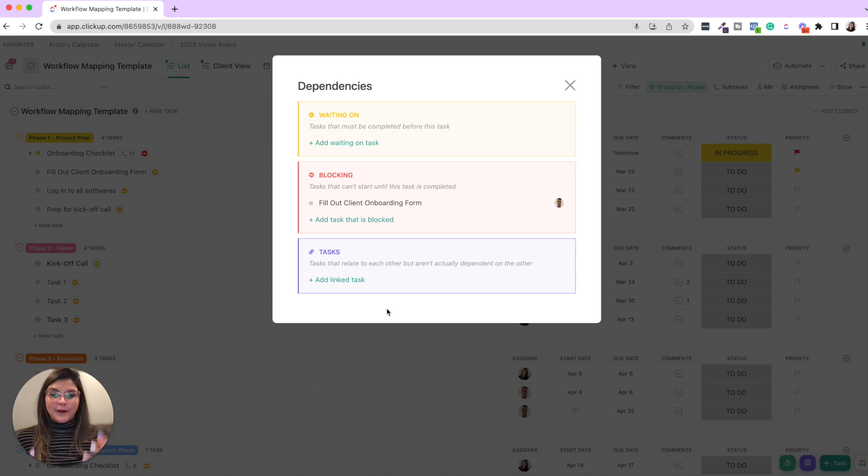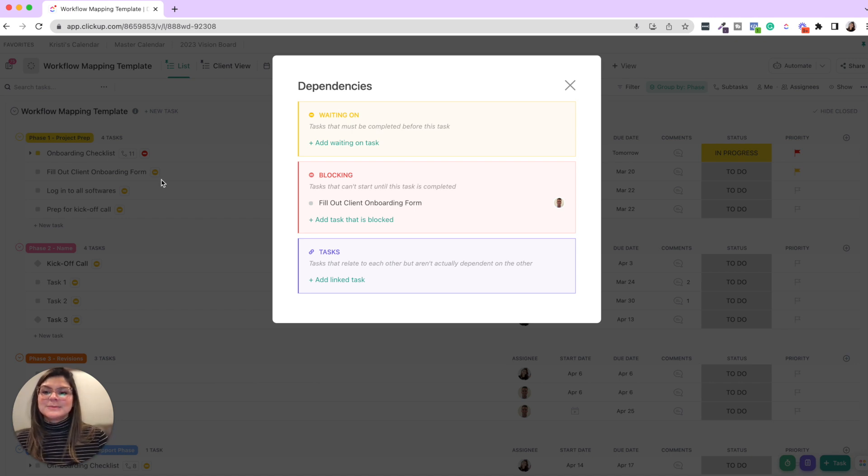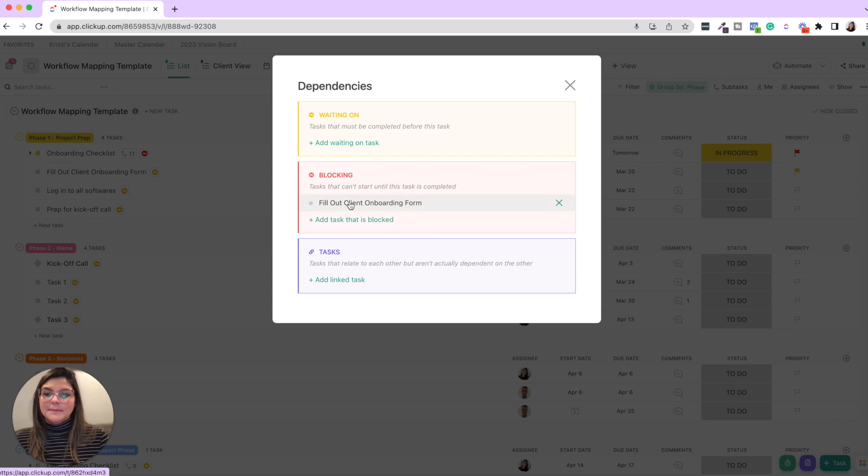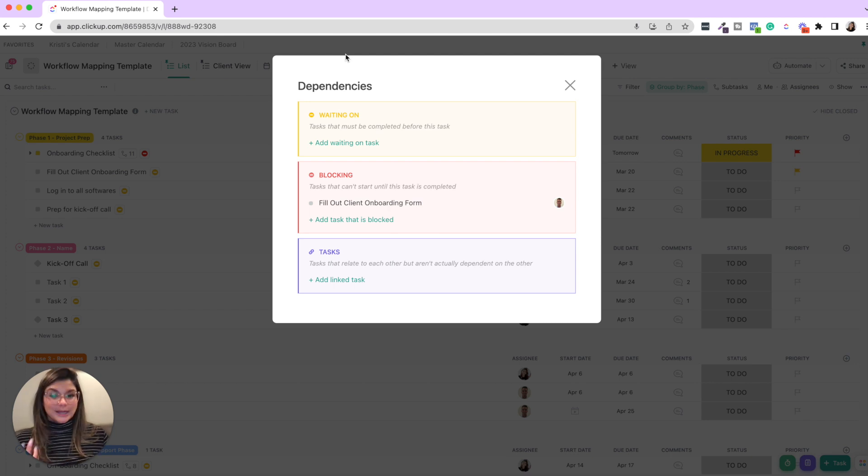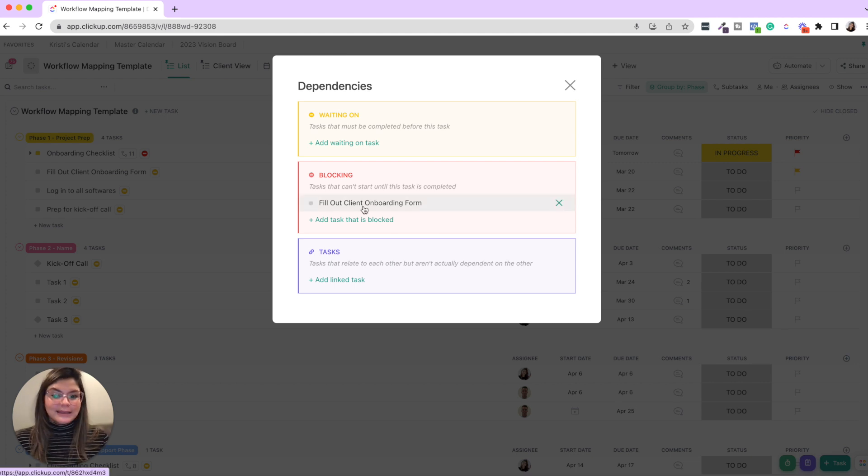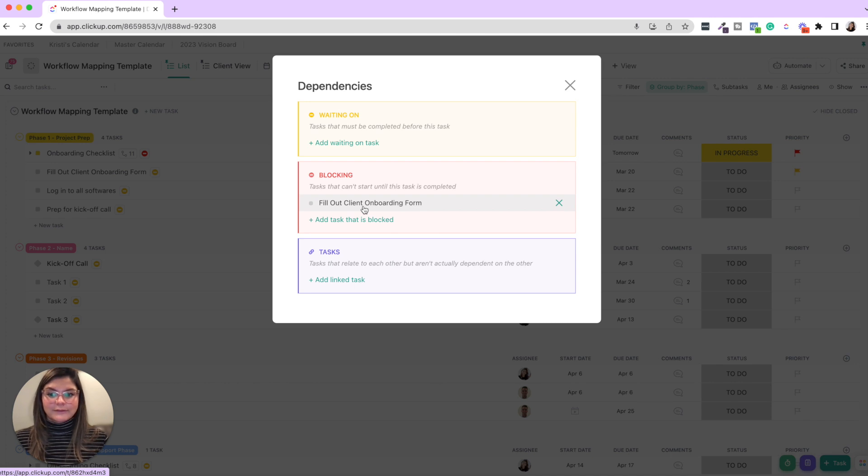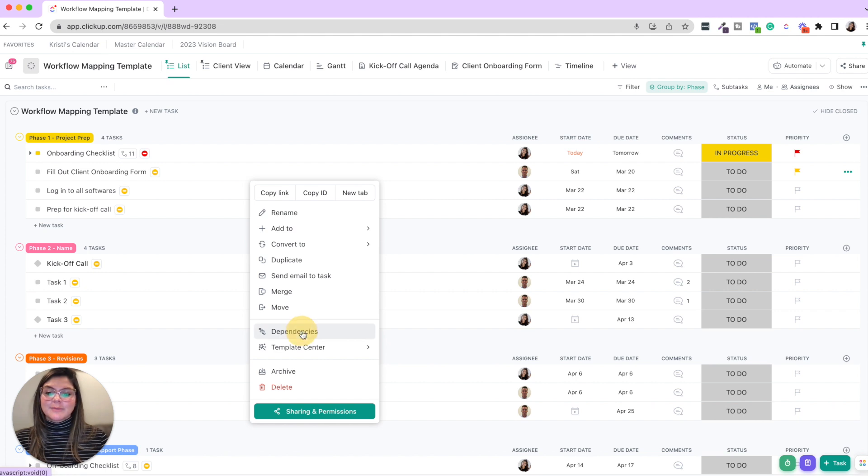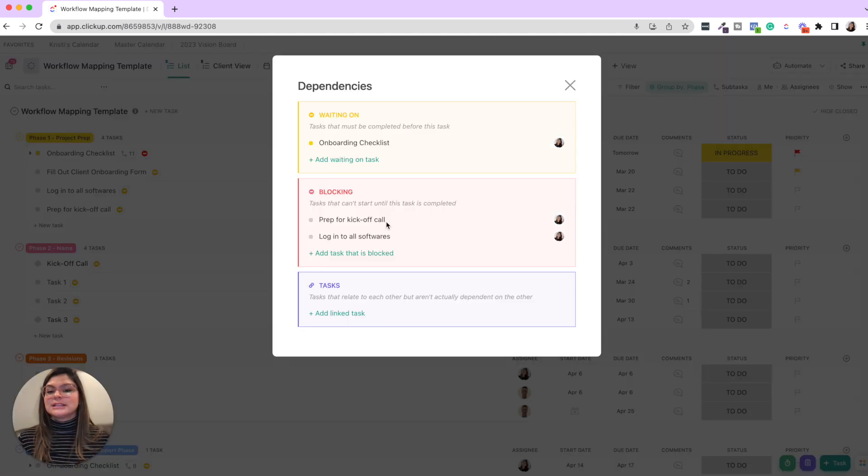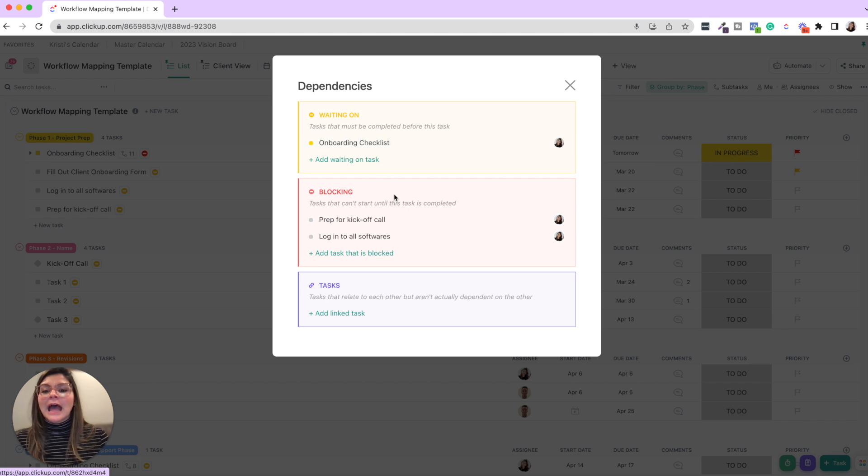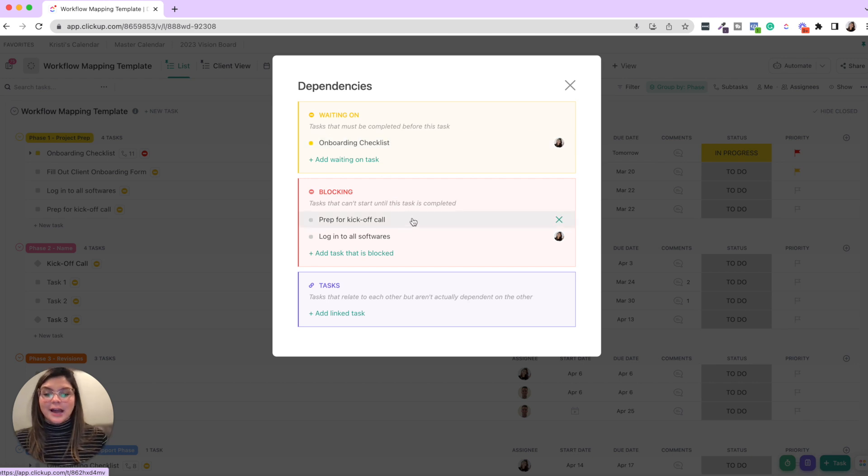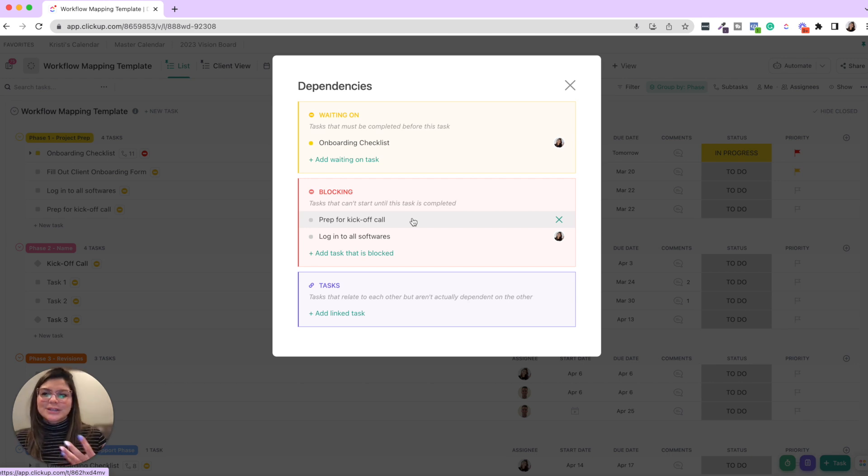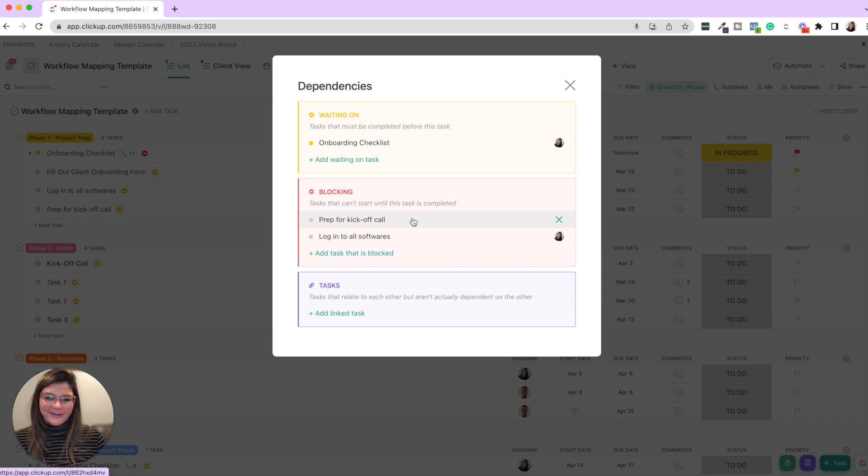And then from this menu, you'll be able to say this specific task, onboarding checklist, it's not waiting on anything. This is the first thing I'm doing in this project, but it is blocking the client from filling out the onboarding form. Then you can go into fill out onboarding form. If you look in dependencies, you'll see that this is waiting for the onboarding checklist to be done. And then it's blocking prep for kickoff call and log into all softwares.